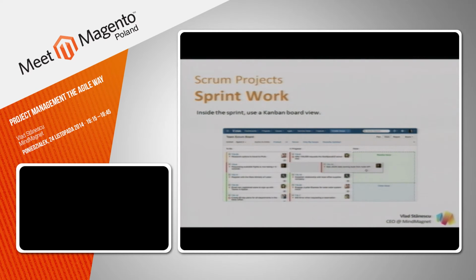So in Agile, tasks that are in progress, which are tasks you invested time in but haven't completed yet, are considered inventory, and it's advisable to avoid them. So the priority must be to move as many things into done and have as few tasks and stories inside the in-progress status. There are also some teams that set a limit on this, so you can't take a new task from the to-do list until a task is moved out of the in-progress list.